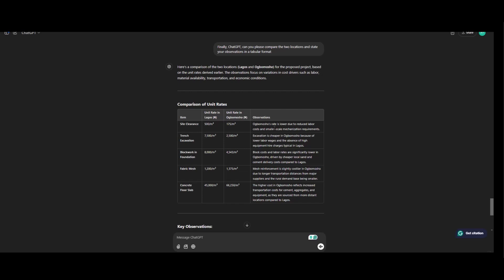So these are the observations. Ubumosho rate is lower due to reduced labor cost and smaller scale mechanization requirements and the absence of higher equipment hire charges typical in Lagos. Block work costs and labor are significantly lower in Ubumosho, driven by cheaper local sand and cement delivery costs compared to Lagos.